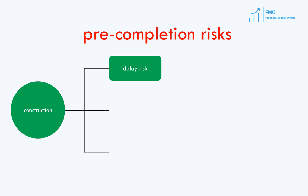Delay risk is an important risk that needs management and mitigation. This risk is dealt with through an EPC contract, where the EPC contractor will have to pay penalties to the project company for each day the project completion is delayed. These penalties are usually equivalent to the costs that the project company incurs, including the cost of lost opportunities. Essentially, the losses that third parties such as lenders or suppliers make because of the project completion delay are passed through to the EPC contractor.